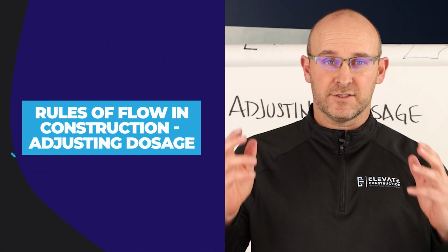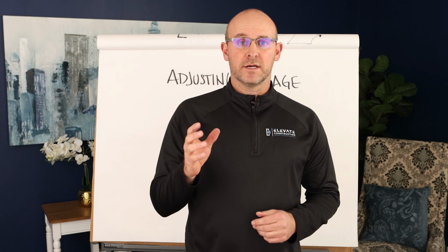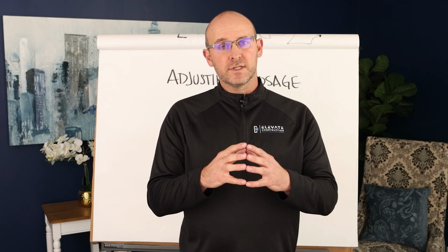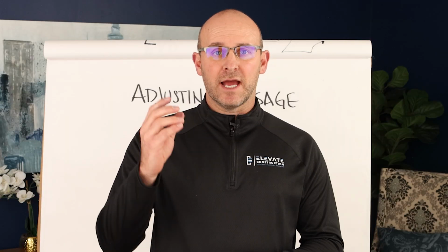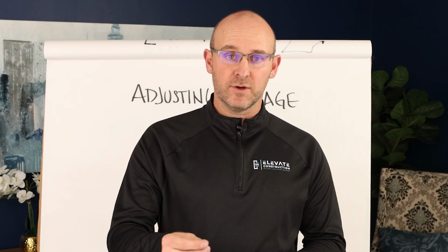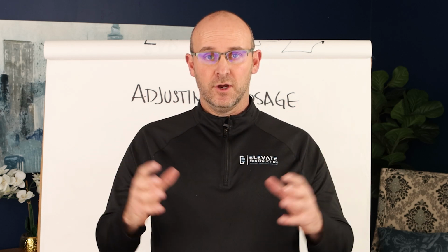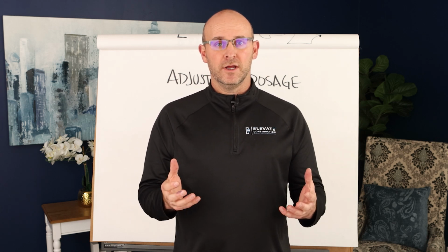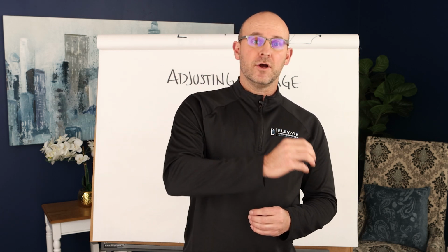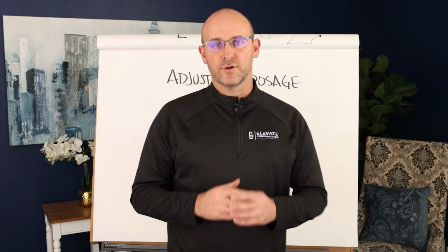Rules of flow in construction, adjusting dosage. This concept is absolutely crucial when it comes to running a construction project because most of the time we have too many things to oversee. We're not doing it well, and that means that we have mistakes, we have rework, we have stops and restarts. And so by increasing the dosage or the focus on one task at a time, we can really start to do things right from the beginning, not have that rework, not have those stops and restarts, and really start to flow on our construction project.